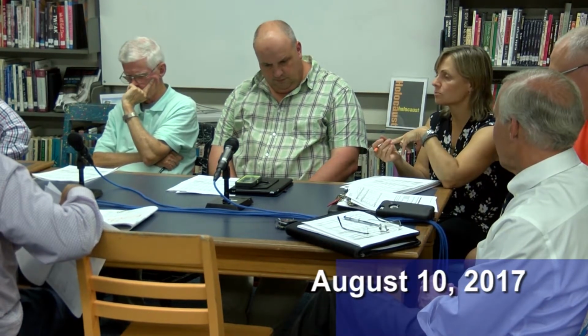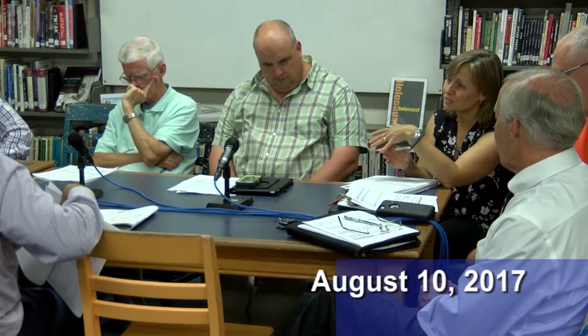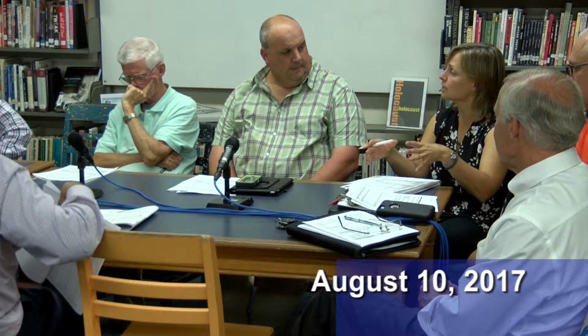In February, in terms of FF&E, we're getting a few things. We're going to get the kitchen smallwares package, the cafeteria furniture, the kitchen office furniture, and in terms of the addition, we do want to make sure we purchase the technology carts for the teachers, because the technology will start coming in. So technology, pretty much the same exact schedule.